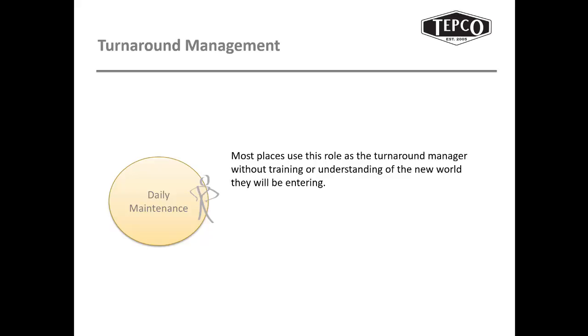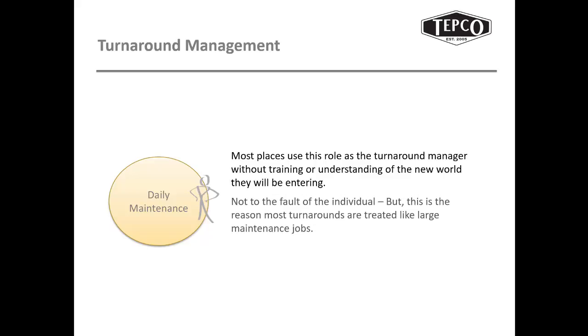They may be great in the field, but from a cost control perspective, it makes it very difficult if I try to manage a turnaround by work order or by job. And that's the way maintenance generally does it, with work orders or tickets on a daily basis. So this isn't to the fault of the maintenance manager, but putting the right person in the right role, or at least getting that person the right training to understand the full environment that they're fixing to get into.